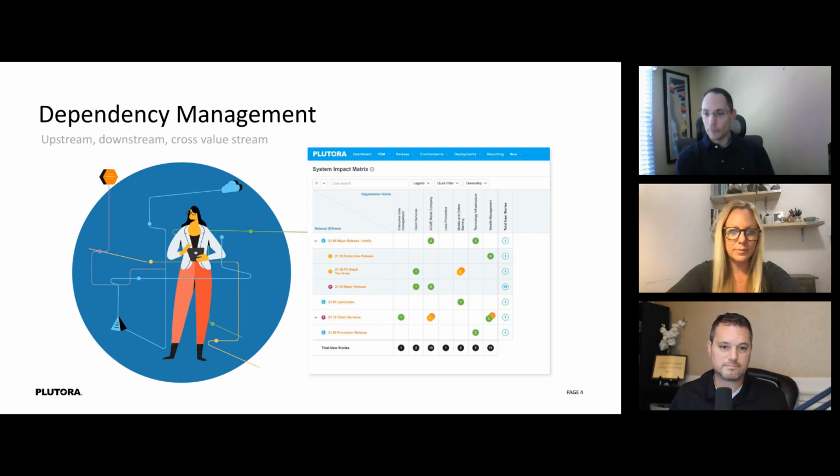So manage by exception. And the worst case example is, application A can't make the release because they've got some defects that they're working on that just can't go to production. Is there anybody that needs to be aware of that, right? We don't want other guys that maybe are upstream, downstream from them to go to production if that application doesn't, because then what happens? You have a significant impact in production, and now you have a major incident, and you don't want to deal with that, right? And we've had that happen in the past, and now we're a lot better at that because we can see those things and we have awareness.